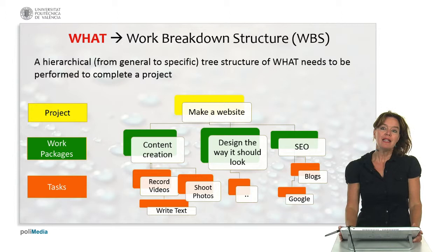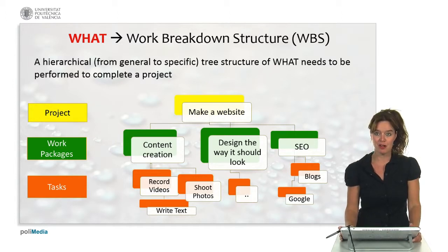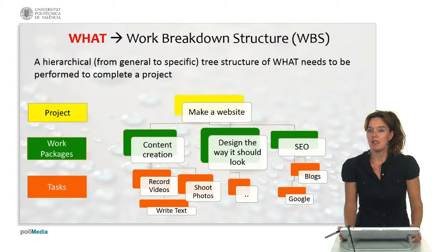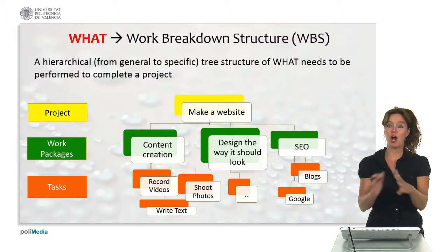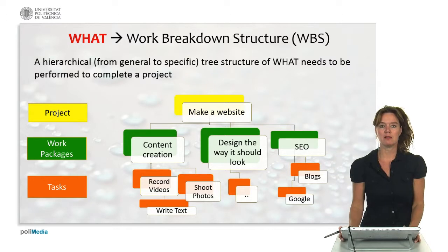One technique that is being used to determine what tasks we need to do in a project is the work breakdown structure, the WBS. This is a hierarchical way to structure what needs to be done to complete a project. So here below we see a small example. It's to make a website. So imagine we want to make a website, which is our project. We've marked it in yellow.